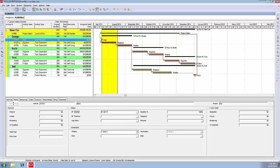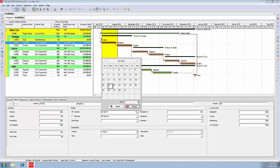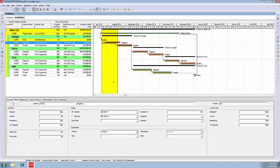We can now go forward to the next activity, 1020. Here's our activity, 20 days long, Geoff Young working on it. Let's assume that it started, but not on the 21st. Let's assume there was a delay, for whatever reason, a week's delay. Instead of starting on the 21st, we actually had to wait until the 28th to start. We haven't finished. Which means we haven't finished. We'll push to the right of our current or new data date. We've started. We haven't finished. How many days do we estimate are remaining? Well, we've slipped by five days. We've gone forward a month. We anticipate that there are still five days remaining to be done. Put that in. We enter it. And the computer works out that we've done 75% of the job.